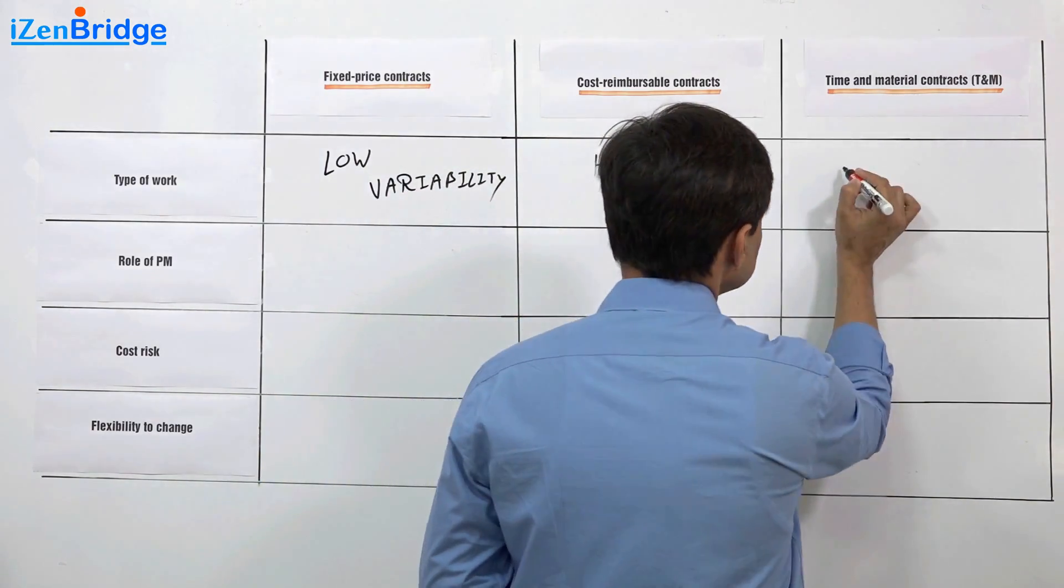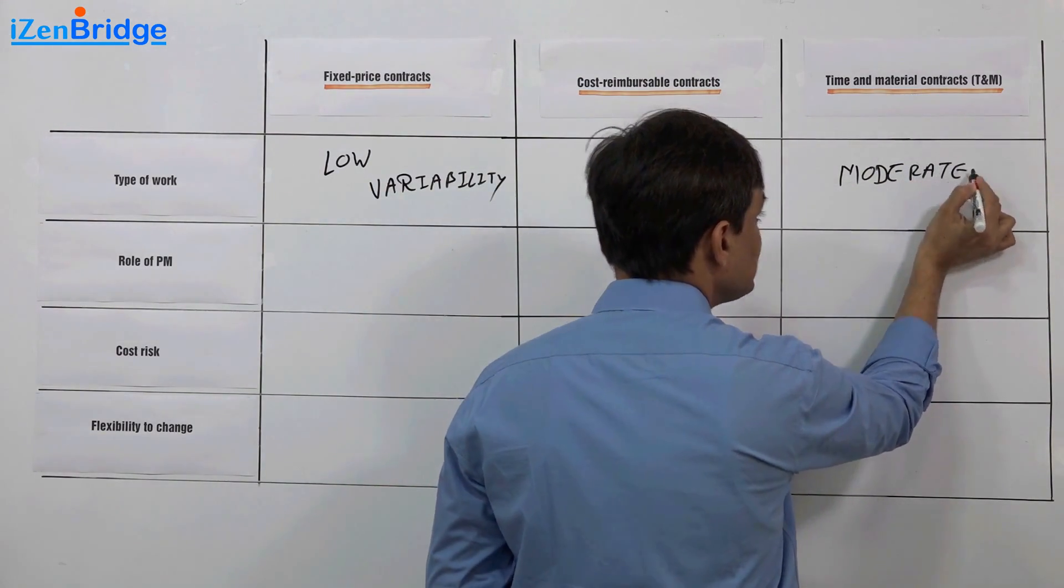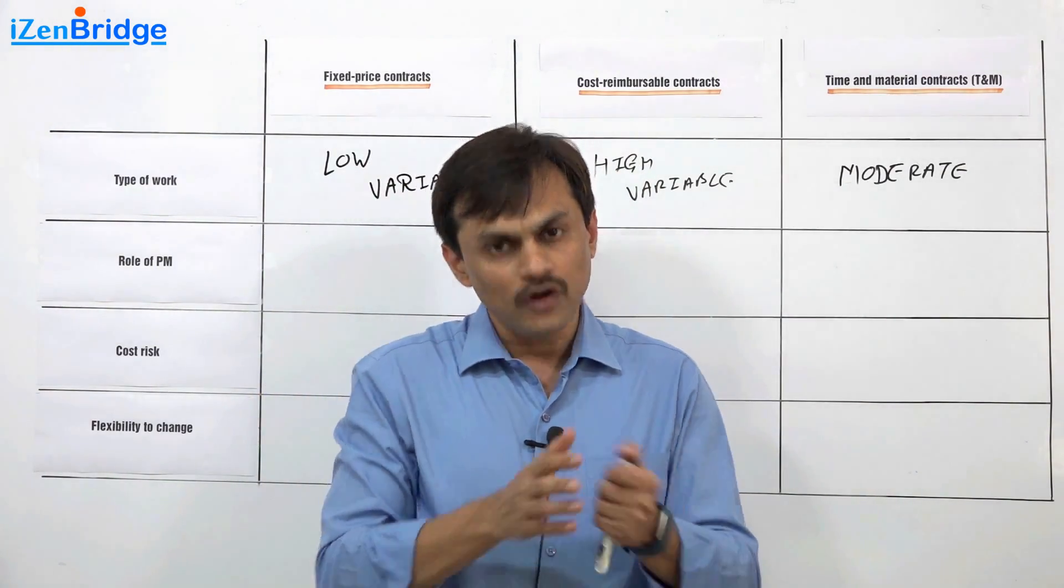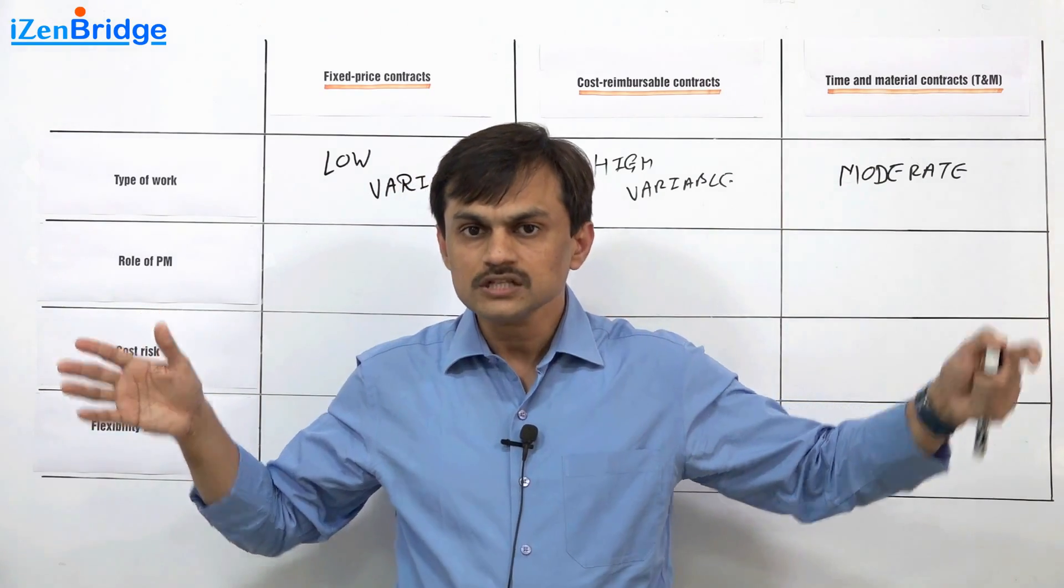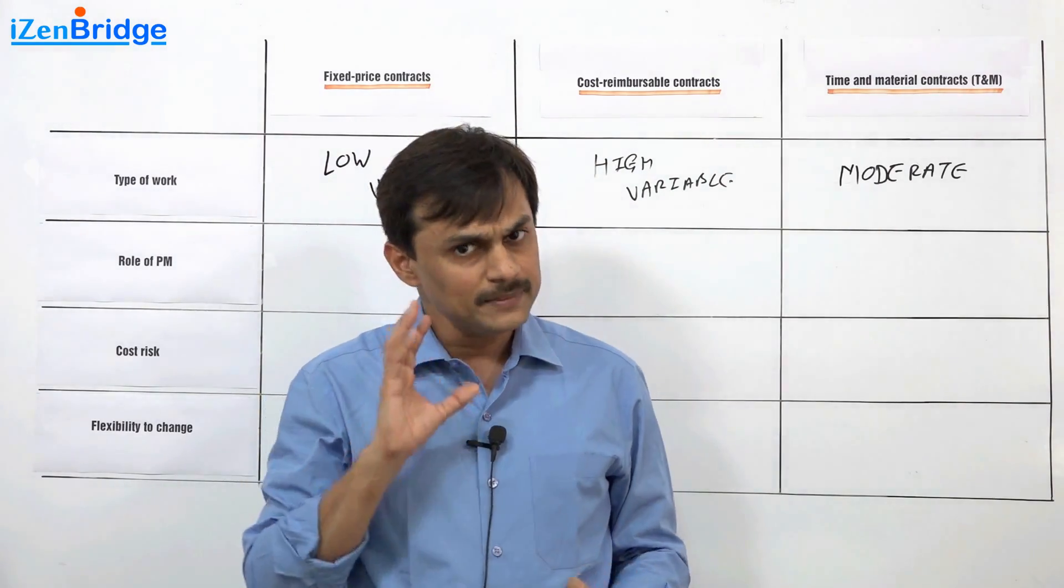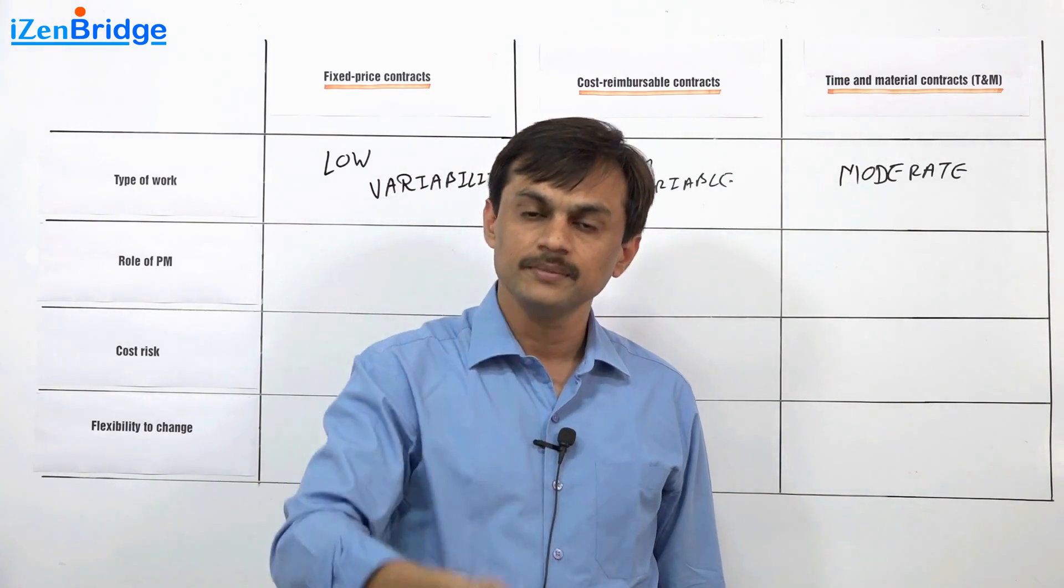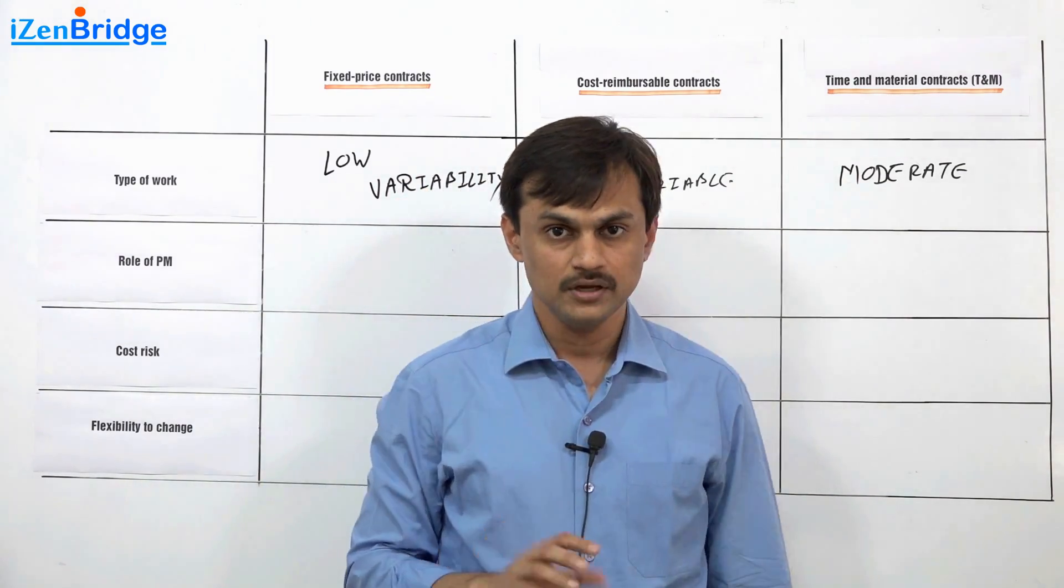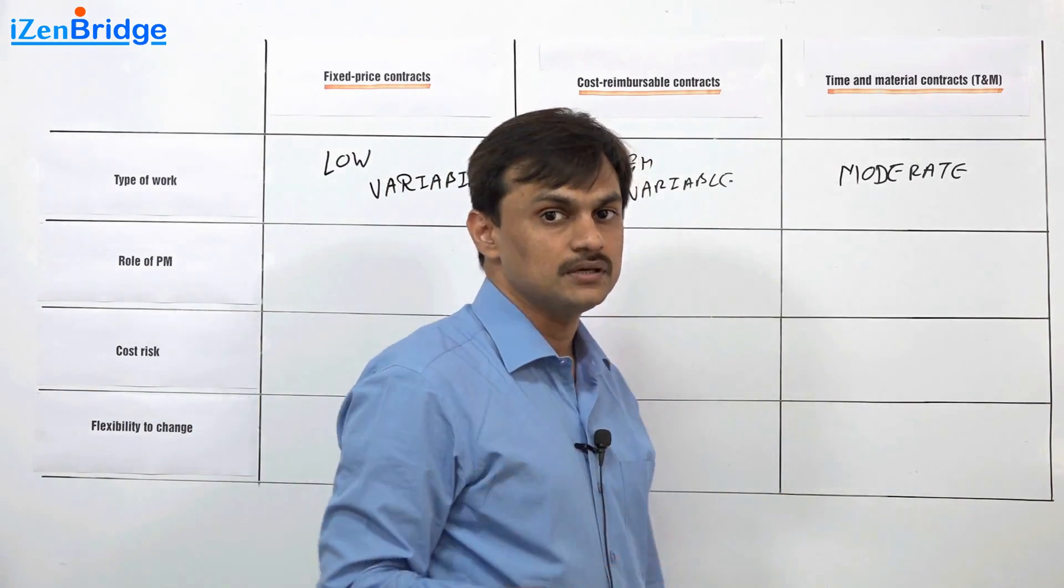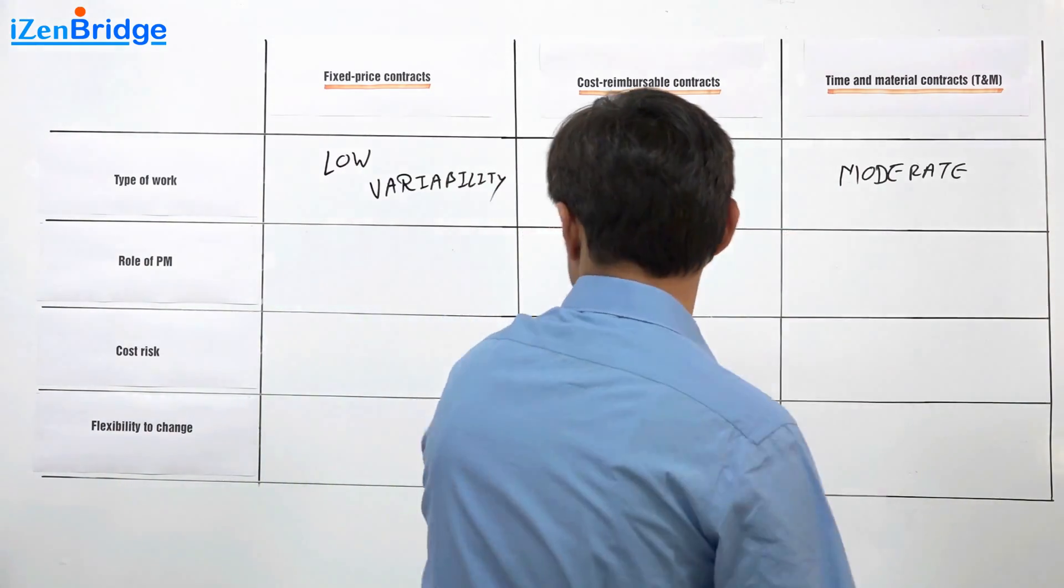And in case of time and material, I would say moderate variability. You do have a certainty of the type of material and type of time and type of resources needed, but you do not have predictability of how much time it will need. So you know that there are ten workers I want to hire. I may need it for one month, I may need it for two months, but I am clear that this is the type of skill I need and these guys can do that work. So why can't I have an agreement on hourly, monthly rate of these people. You do have a variability but it is a moderate variability. At least the process, material, people are pretty much predictable.